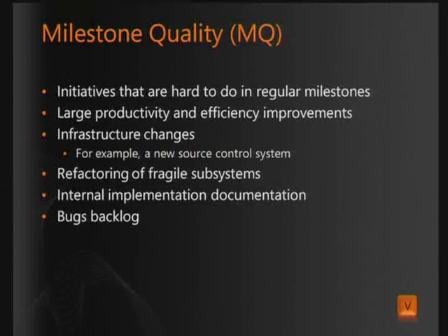After we ship, we often do a quality milestone. That's before even planning starts for the next version. We ask, what is the debt that we acquired during the last release? Maybe we shipped something internally that we were not happy about, and it doesn't immediately affect the quality of the framework, but over time it will be impactful to the quality. So let's fix it.